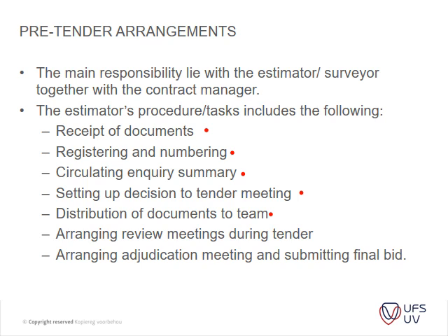Distribution of the documentation, arranging review meeting. Once we've done the estimation, you have a review meeting to say, are we still going on or not? Arranging adjudication meeting and submitting the final bid. So this last one is now at the directives level.